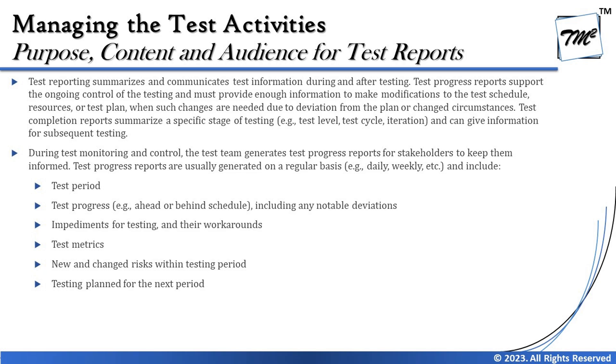The report also covers new and changed risks within the testing period. As discussed in section 5.2, risks are not analyzed only once at the beginning — it is a consistent activity to monitor emerging risks as the product evolves. Finally, the test progress report includes testing plans for the next period, so for example after sprint one you can reflect your planned actions for sprint two.